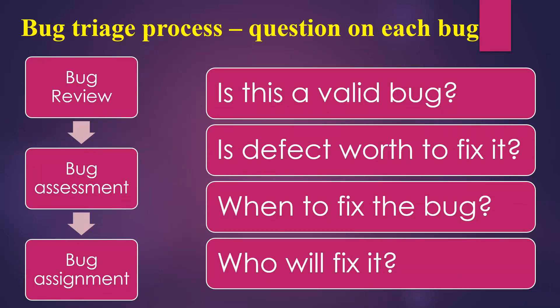How the bug triage process is executed: all team members gather and each bug is reviewed — the bug name, bug ID, and bug description are taken up by the QA lead or test lead who performs an assessment. The bug is then assigned to a particular developer. Four questions are answered for each bug: Is this a valid bug? Is the bug worth fixing? When should it be fixed — current release or next release? And who will fix it?